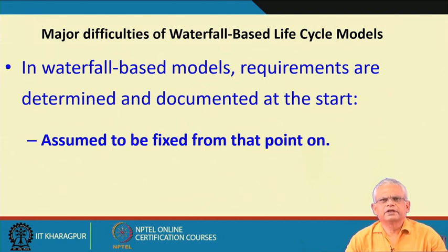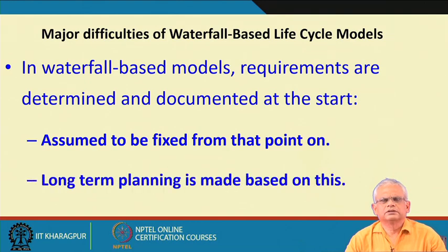The design is made based on this documented requirement, even test cases are written based on this documented requirement, and therefore any change to this requirement will require changes to all documents, and therefore those who use the waterfall model heavily discourage the customer from making even small changes.